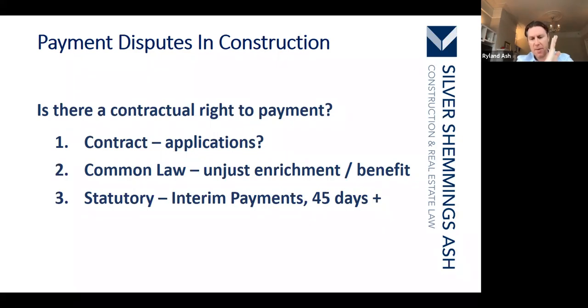So what happens if there is no contract and you've still done work? Do you get paid? Well, I can tell you the answer is yes, you should. You have an entitlement to be paid. And that's because the common law, the English common law, comes to the rescue. And that doesn't mean your mates from the pub come and bail you out. What that means is that the common law has developed over time principles which will protect a party that has provided some form of benefit to another party.